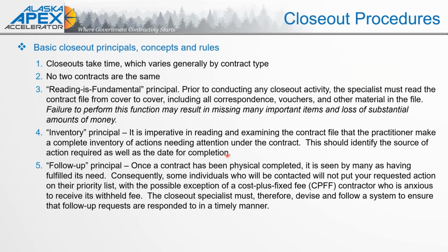All right, so moving on. Let's talk about the closeout procedures. So we defined when it's time to start the closeout process. The work's been done, the final invoice has been submitted and paid, and now we're gathering our documents.